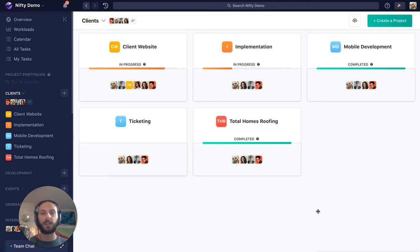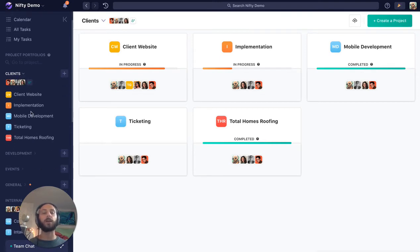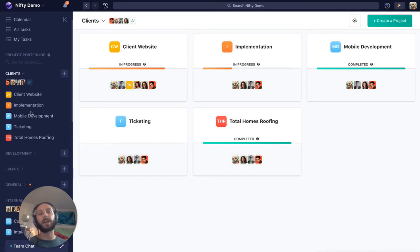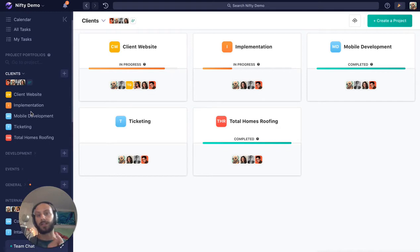Now the first thing we want to consider is how to use these portfolios. As we've probably learned by now, guests are not invited to portfolios. Guests are invited to specific projects and guests do not even know the name of the portfolio their project is in.